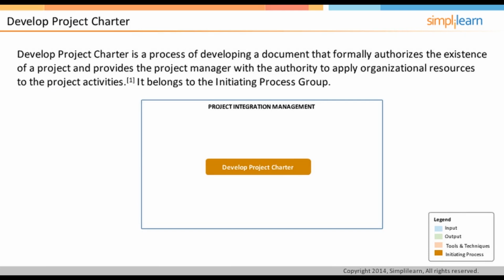A project charter is essentially a document that authorizes a project. Once a project has received a charter, it means that the project manager can start employing the organization's resources for the project activities. Let us look at the key inputs to be considered in preparing the project charter. The first input is the Project Statement of Work.